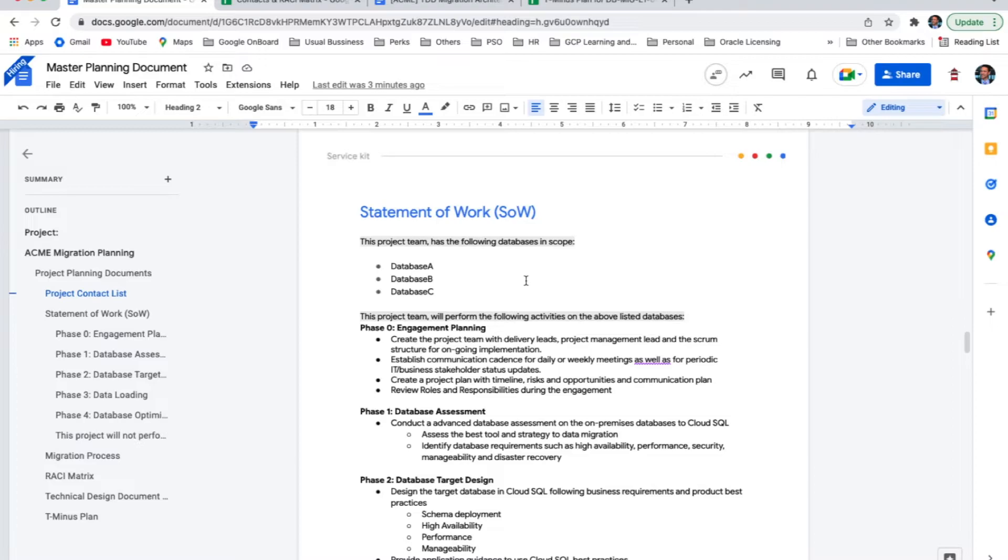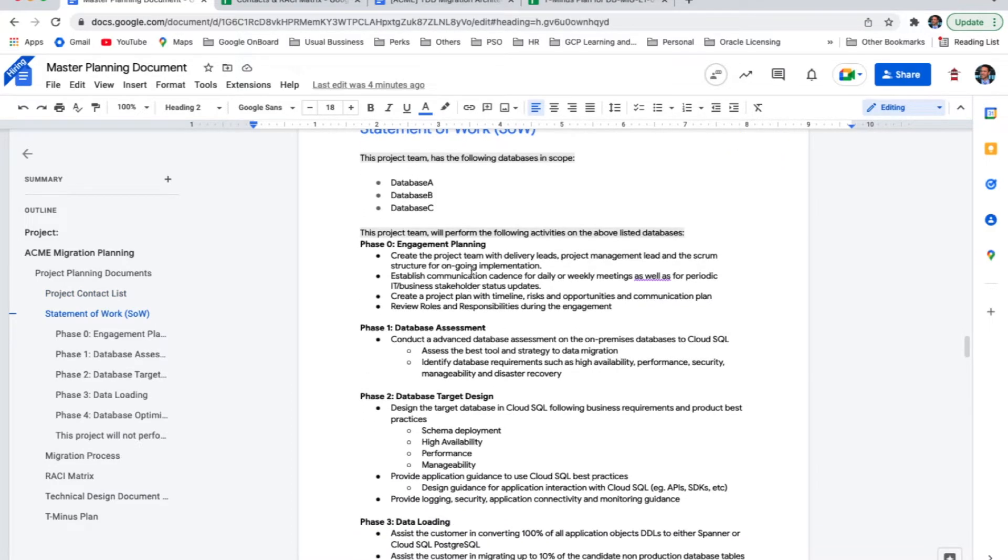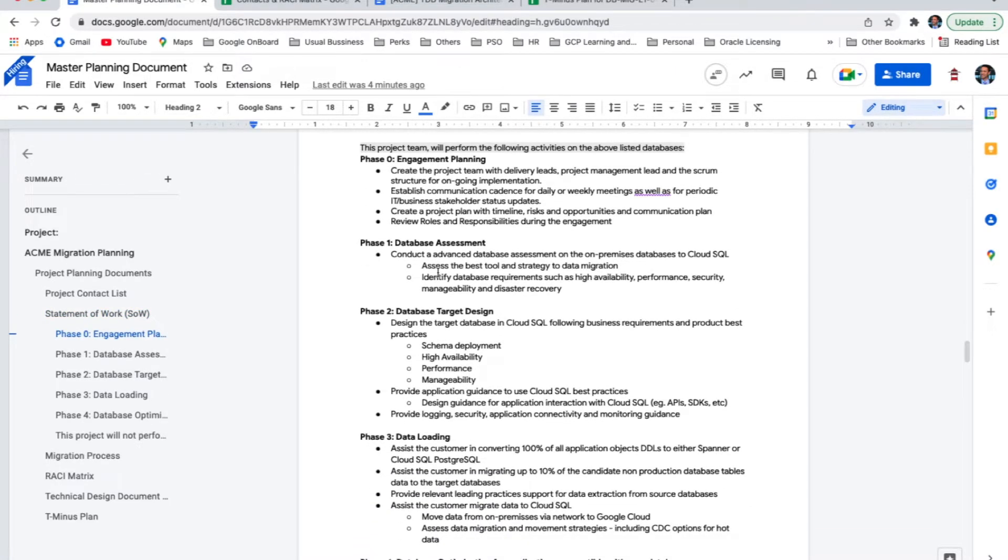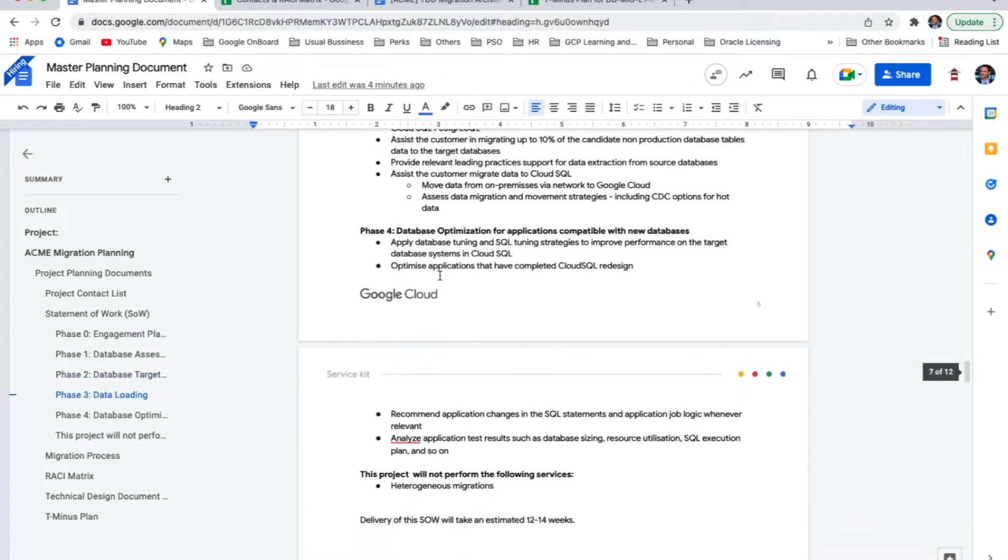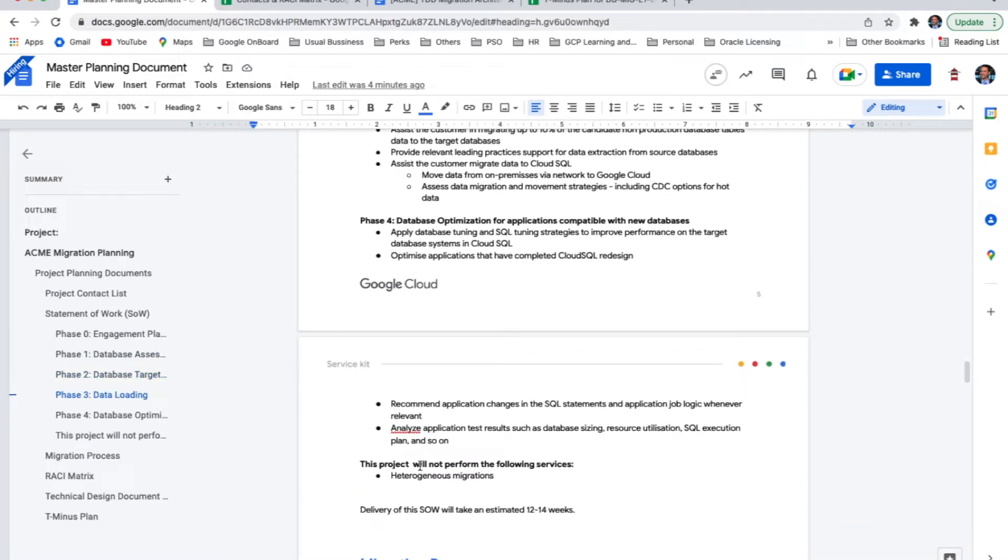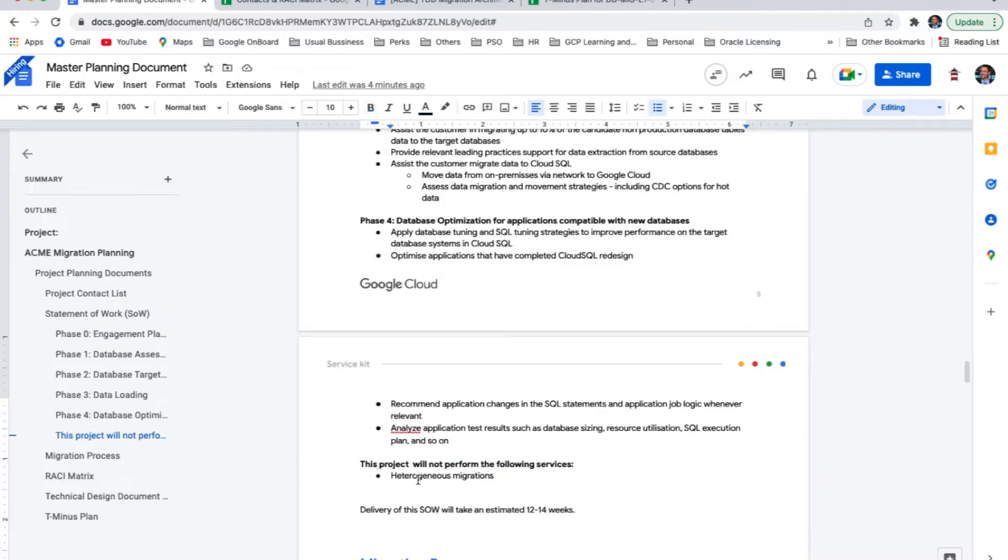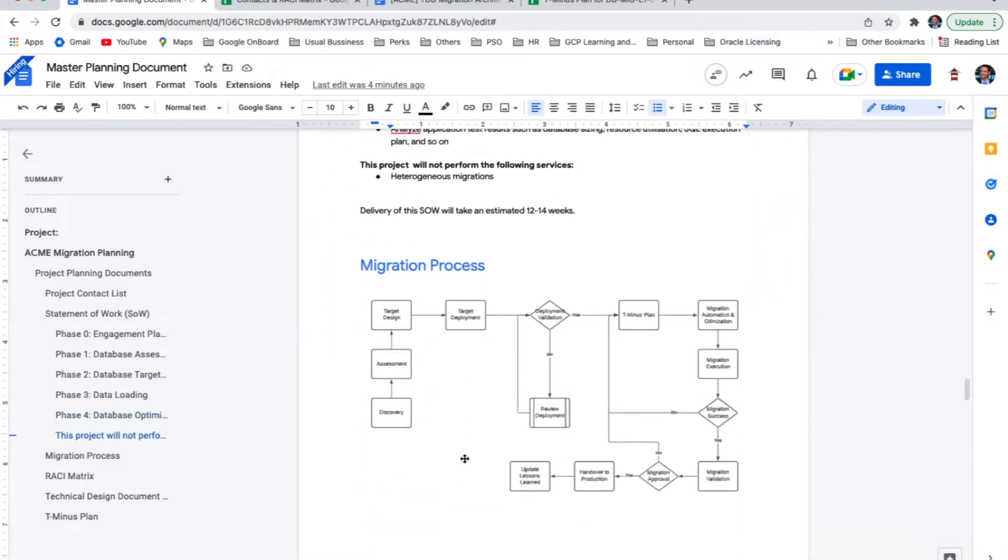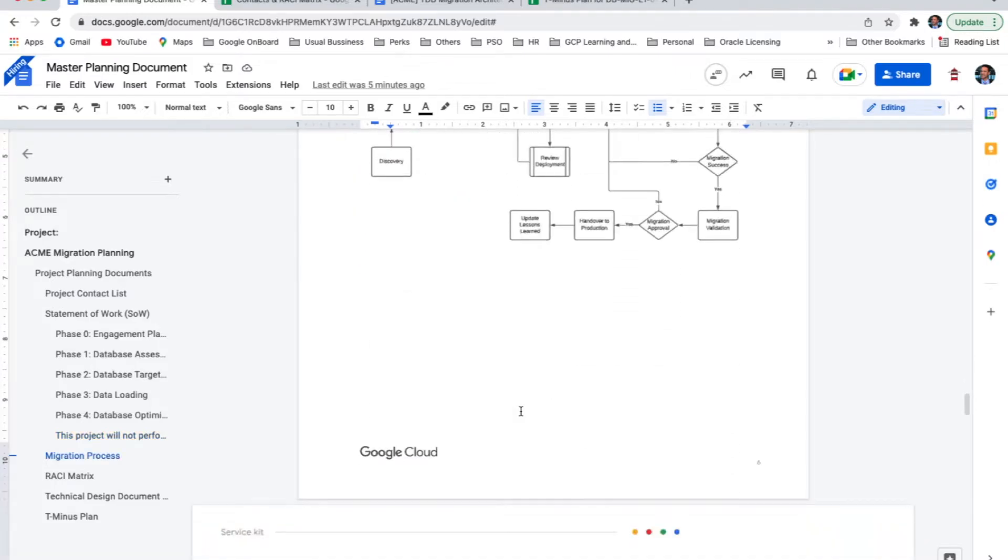The next section we are going to demo is actually statement of work, which is going to lay out the scope of this project. It might be an internal project for your company, or it might be a project that is being executed by a partner. In the end, it doesn't matter because all of the projects should have a scope. In this example, we are showing a scope that is asking us to migrate three databases. And it separated the scope into phases, very similar to our framework. It also calls out all the tasks and activities that are not part of this project scope. In this example, heterogeneous migrations. It also states that this exercise or project will take approximately 12 to 14 weeks. Next section, migration process. And in this phase, you actually get to see many similarities to our migration framework we discussed before. But the difference is that in here, you have a much more fluid process which helps us to understand how the communication should flow within my project.